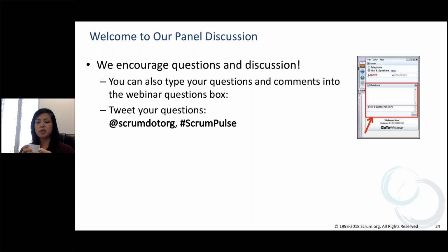Now, the other misconception of the Nexus integration team, one I hit on, was it's not an integration team in terms of it's not doing the integration work, right? It's a focal point for integration. But the second thing is that it's also not a management team. So this isn't where we would take all, we're doing Agile, but now where do the managers go? They all go in the Nexus integration team. It's not meant for that. So think about what makes sense in terms of who you can invite from externally to bring them into your conversation. And if the stakeholder's there just because they want to be there and understand the status, it might not be the best use of their time or for the purpose of Nexus.